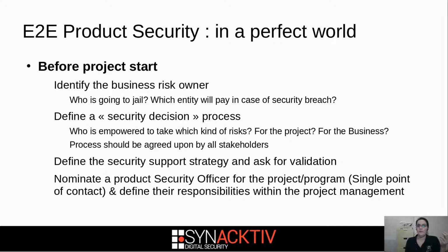You should define what I've called here a security decision process. The idea is to decide before the project who is empowered to take which kind of risk. And I'm talking about project risk. What I call project risk is everything that could cause delay, quality issue, cost issue for the project, or business risk. Okay, what happens if two years from now there is a vulnerability and I lose my client data, for example? So who is going to take the decision?